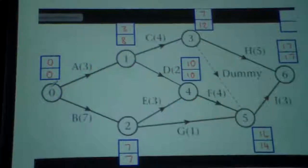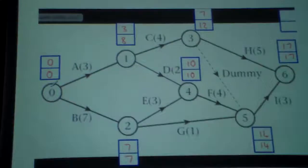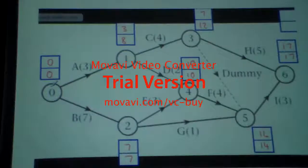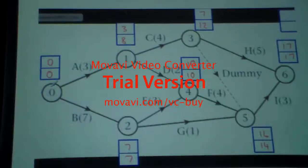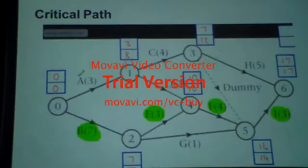So there will be critical path. The critical nodes are 0, 2, 4, 5, 6. So the critical values are 17 and 17, 14 and 14, then 7 and 7, 0 and 0. That is the critical path, as we will show in the next one. The project duration is 17.